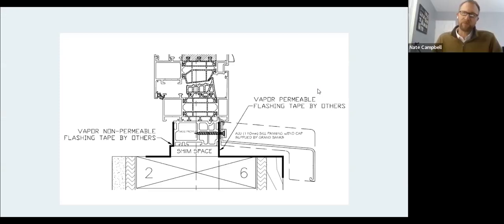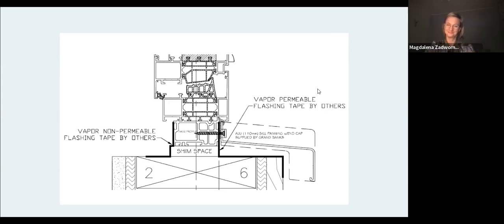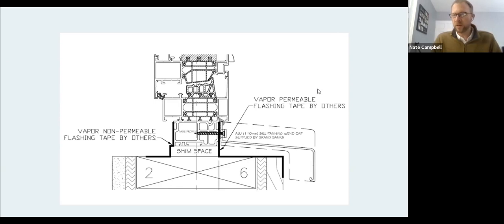Yeah, definitely. Typically in a typical time, we would see an 8-week manufacturing process, with, in a perfect world, 3-week, but typically 4-week shipping. At this point, I'll let Magda weigh in on what you're seeing on your side as far as manufacturing in the past few months.